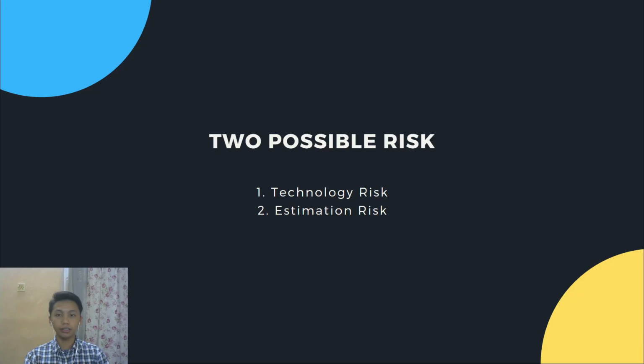The first possible risk is technology risk. There is a possibility that the programmer used the wrong method to implement and develop the Decathlon Measure website. This level of probability might be low, but the effect is serious. To overcome this, the programmer needs to analyze whether the requested function can be done according to the time and budget of the project before agreeing to the client's request.